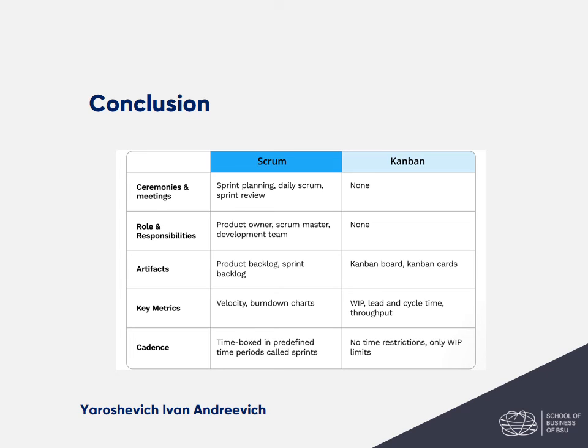It can be concluded that the choice of technology depends on the specific project. If development is limited by tight timelines, Scrum is suitable. Where work is of a research nature, Kanban is more convenient. But both Scrum and Kanban make it possible to make software product development more efficient and democratic, to form a team from employees, and to establish healthy, friendly relations within the team. In addition, both approaches can be considered customer-oriented, allowing you to track users' reactions in real time.